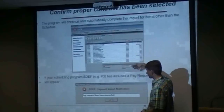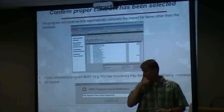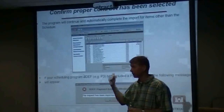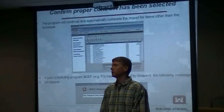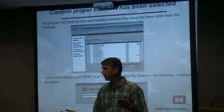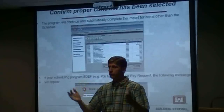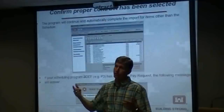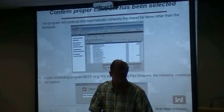If you have imported a schedule and you see a red mark on your payout activities, that means your schedule's unbalanced — more than likely because we've given you a modification. After we sign a modification, the next export unbalances your payout activities immediately. You should be turning in a FragNet with every single response to an RFP. You are obligated to prepare a FragNet — even if your schedule isn't affected, send one anyway because you're going to have to add activities to document dollars. So you turn in this FragNet, and it's your obligation to balance the plans because it's your schedule — not my schedule, not the government's schedule. You have to balance it to make things work out after you've negotiated and agreed.